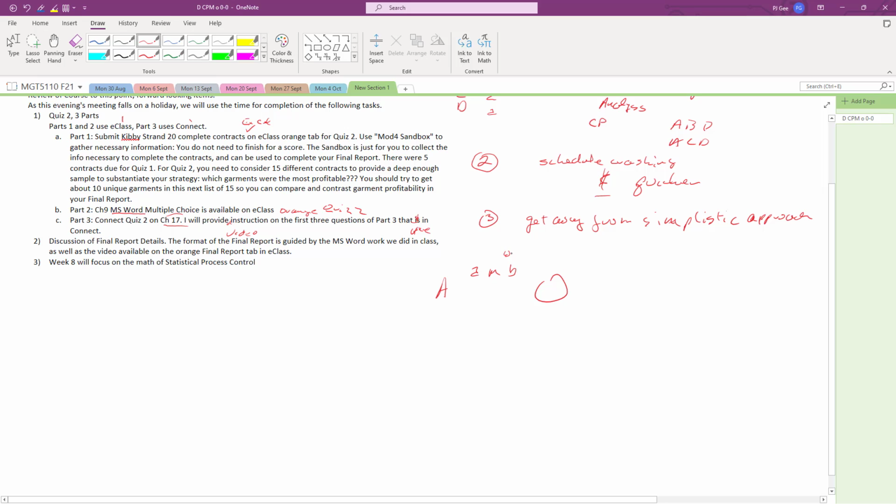This would be the worst case, and this would be the best case scenarios, the optimistic and the pessimistic. And we use this, and these processes follow normal distribution, our friend normal distribution. Okay, and there is a way of analyzing this network now where each of these tasks have these 3 numbers.